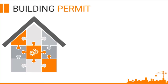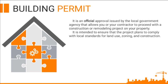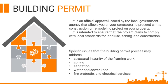Let's proceed to the building permit. It is an official approval issued by the local government agency that allows you or your contractor to proceed with a construction or remodeling project on your property. It is intended to ensure that the project plans comply with local standards for land use, zoning, and construction. Specific issues that the building permit process may address include: structural integrity of the framing work, zoning, sanitation, water and sewer lines, fire protection, and electrical services. The building permit is important — before proceeding to construct, repair, or renovate, a building permit is required. It is your ticket to construct a building.